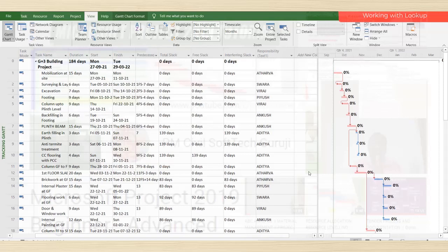if function is concerned, suppose here we'll decide which activity is a critical activity and which activity is a non-critical activity from this project. Suppose as per definition we know the total slack. If total slack, or total float, is 0, then the activity is a critical activity. And if total slack is non-zero, it is a non-critical activity.